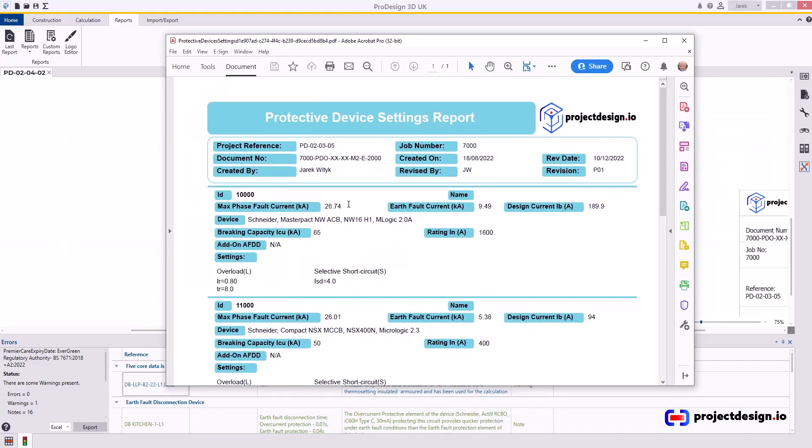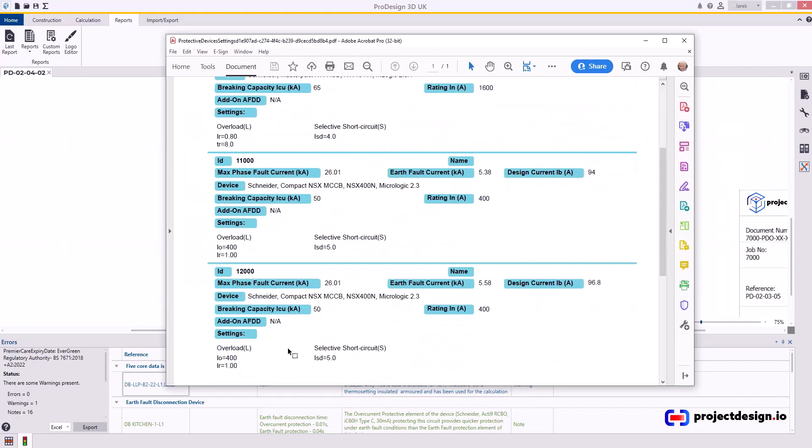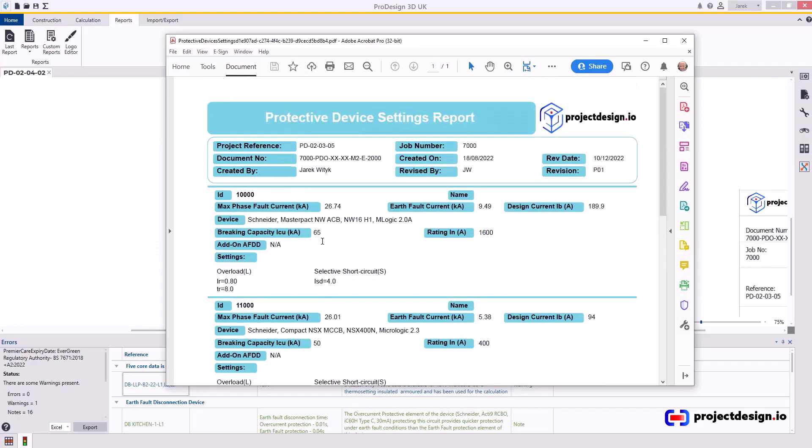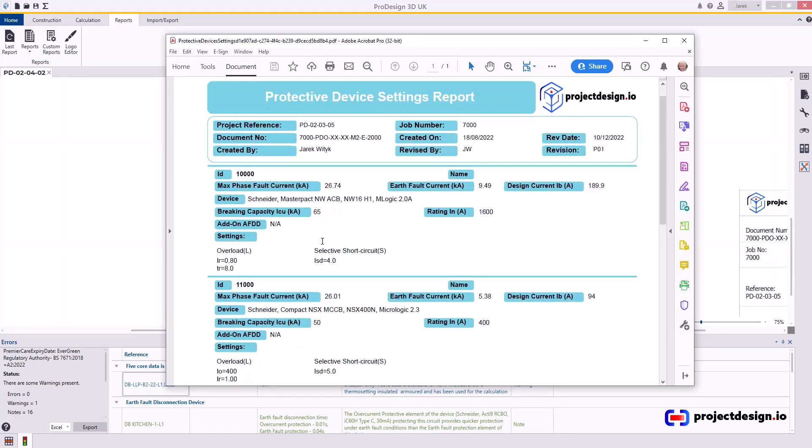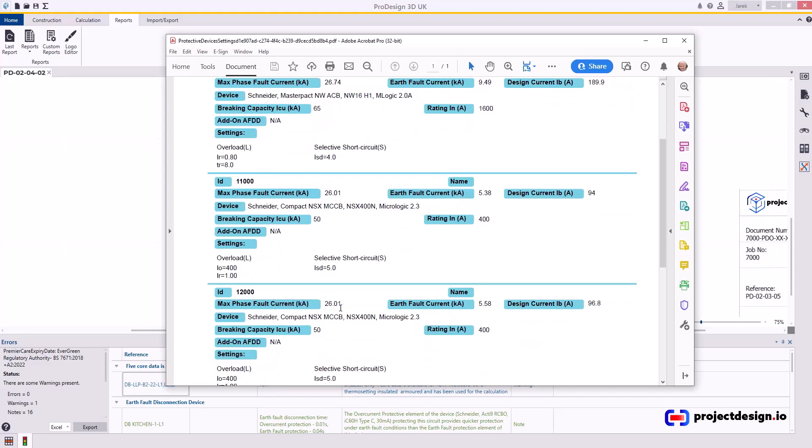And there we go. You have a report with three devices and the settings which you can send to your team on site during the commissioning period so they can check and set the devices as required so the installation is commissioned in line with your design and it will work correctly. This part is very important.